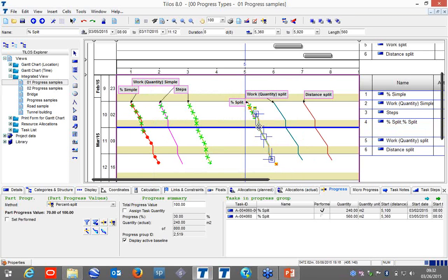You can change the durations, you can change the directions, and this is the percentage, but it is splitting the task. When you have waiting time, for example, you work this year on this part, but winter comes and you are going to work in the next springtime. You can just progress, and the splitting part you can push to the related dates.